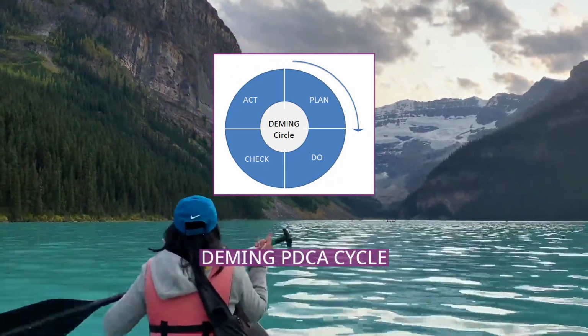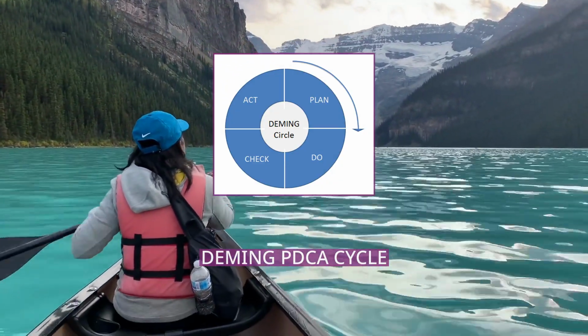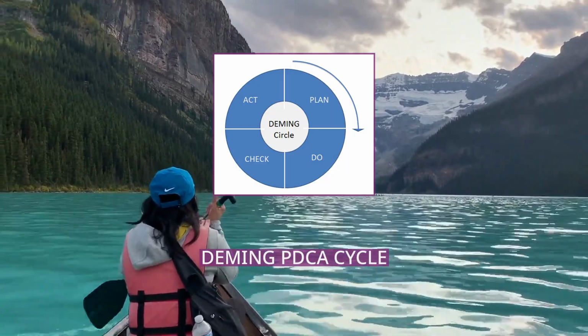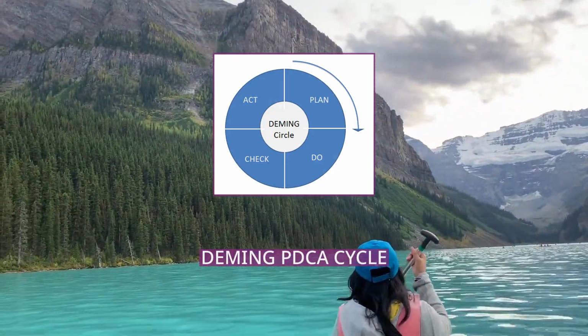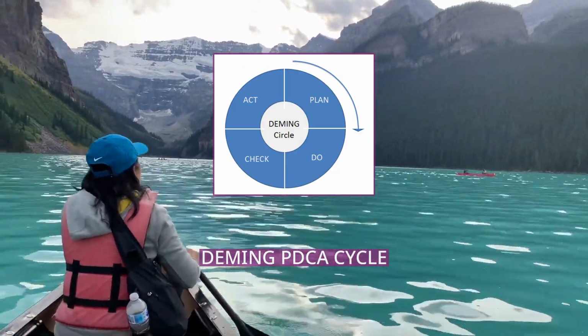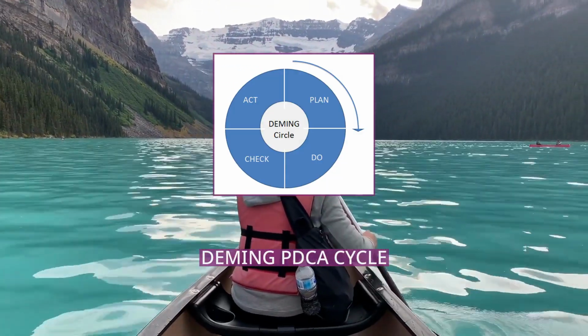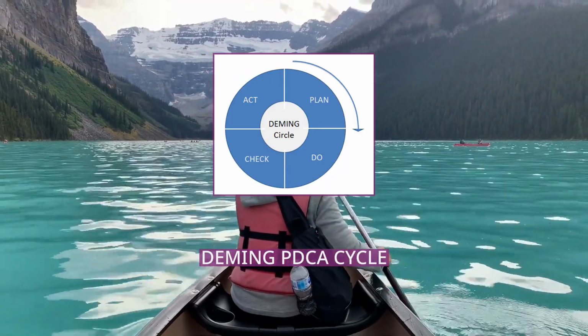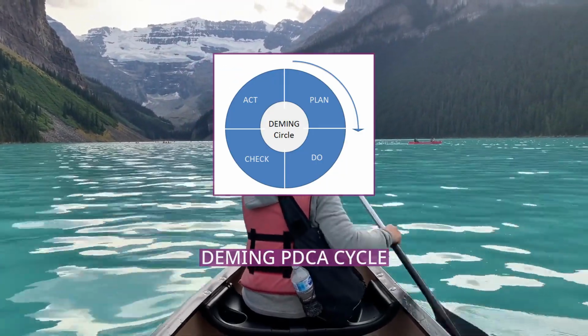In SDM2, the term basic design was replaced by the term global design to indicate that this document was continuously updated and subject to change during both the BD and DD phases. Thus the basic design is both global and detailed at the end of the project. In the global design, the principles of functionality and construction, as well as their relations, are documented. This is how the idea of iterative development got started.